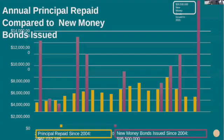Your interest cost on 26.5 million is roughly 3.01%, the average rate of all those bonds. So that's what you began paying. That's the interest rate you started paying in May when they were issued. And you're probably earning, if you're earning 0.25%, I'd be surprised, but maybe you are earning more on those construction fund balances, but that's 3% times 26.5 million.